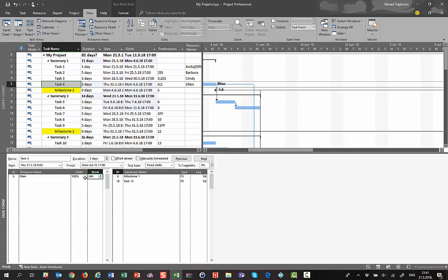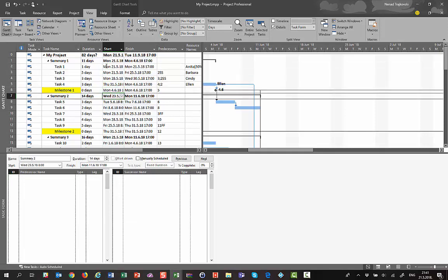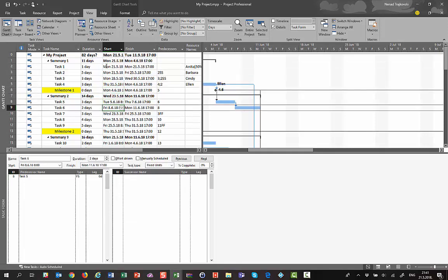And as I told you, I don't use those screens very often because my approach is first of all predecessor and successor. So build the schedule, build the relationships, and then use another screen in which you will assign resources, but that screen is not resources and predecessor, nor resources and successor, but is the next one which I'm going to show you right away.